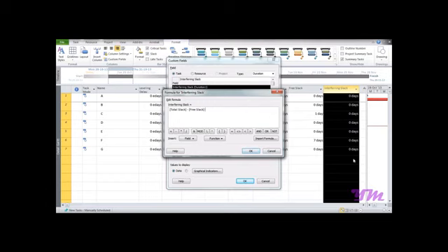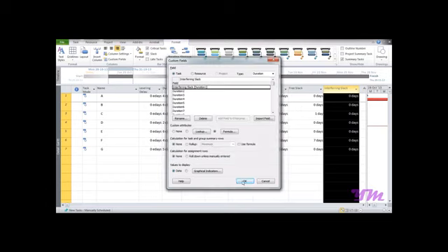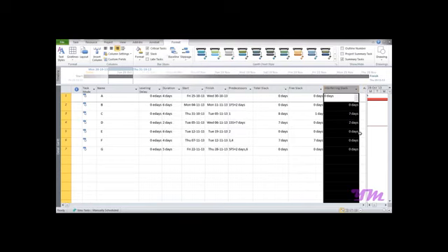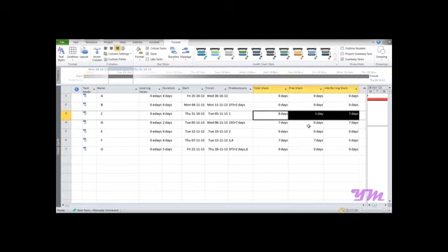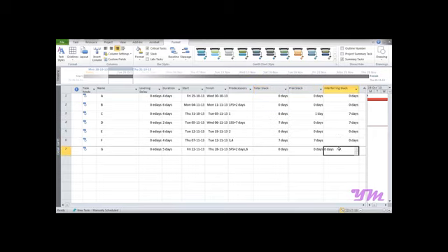So just see over here what happens in this part. OK, and make sure that you have selected this bubble over here and you have entered the formula, and press OK. So you can see over here it's done. It's 0 minus 0 is 0, 8 minus 1 is 7, 7 minus 0 is 7, 7 minus 7 is 0. So this is how we can use the formulas.